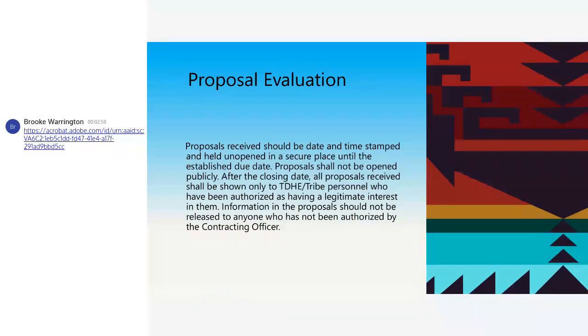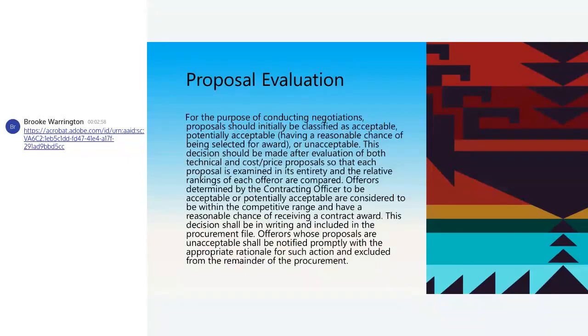Your proposals received should be dated and time-stamped, held unopened in a secure place until your established due date. Proposals should not be opened publicly. After the closing date, your proposals received should be shown only to your TDHE and tribe personnel who have been authorized as having a legitimate interest in them. Information in the proposal should not be released to anybody who has not been authorized by your contracting officer.